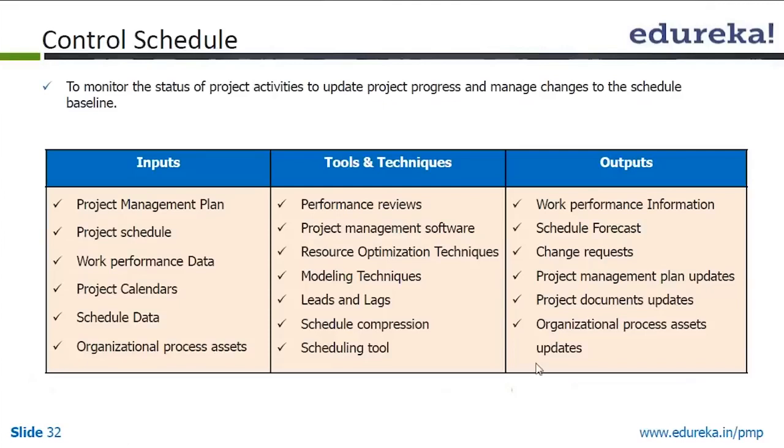So once the schedule is done, that schedule has to be controlled, to monitor the status of the project activities, to update project progress, and to manage changes to the schedule baseline. So what are the inputs? The project management plan, project schedule, work performance data, project calendars, schedule data, and OPAs are your inputs.